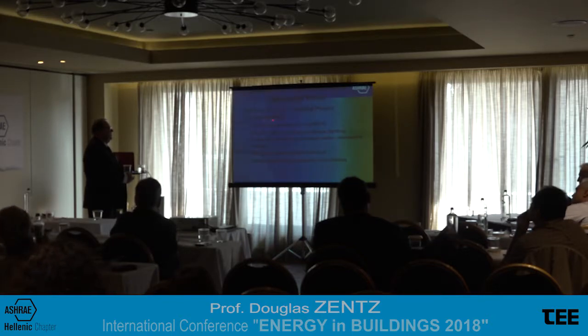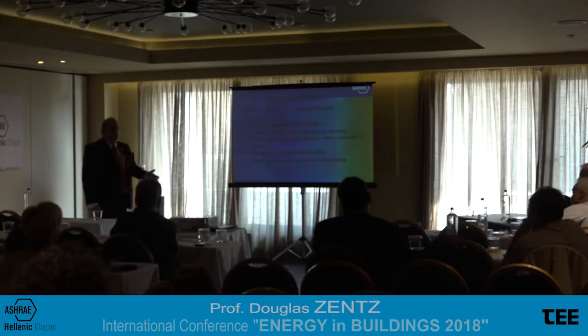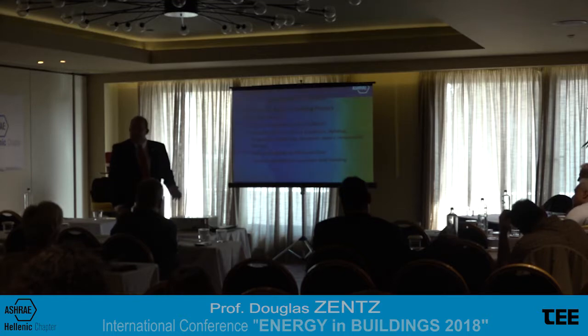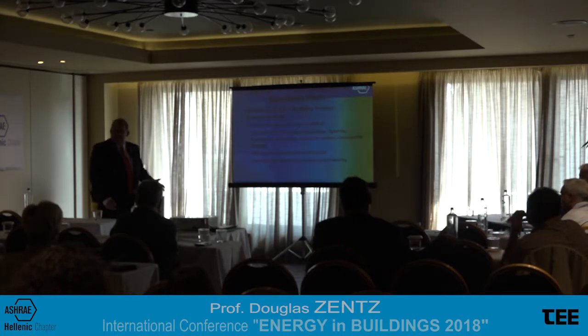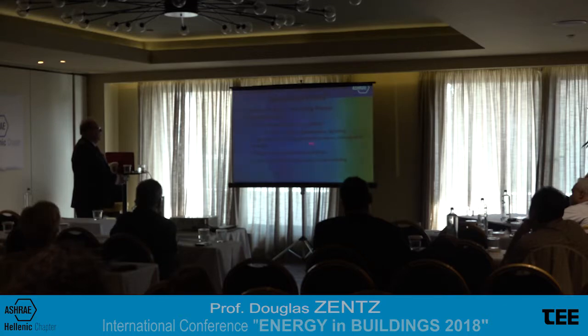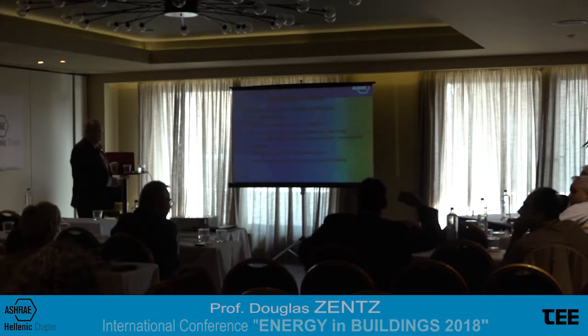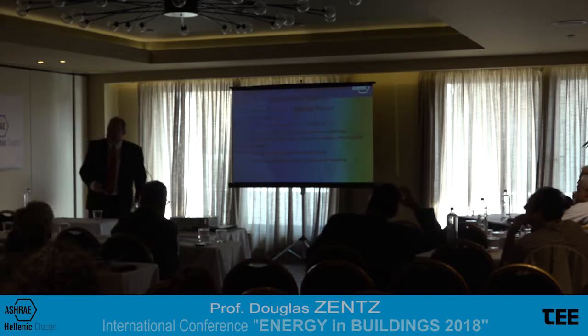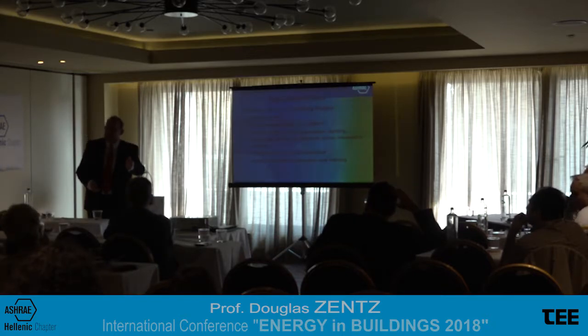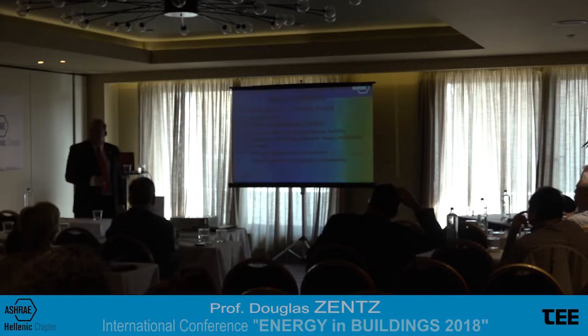And if you're going to do commissioning, they want you to do full commissioning on anything that's over 5,000 square foot, which would be about 2,000 square meters. They want you to have your commissioning process including all these things, which is a lot more than most people do. They also want the commissioning agent involved at various steps of the design phase, because those people have input, good ideas that will make the process easier down the road.